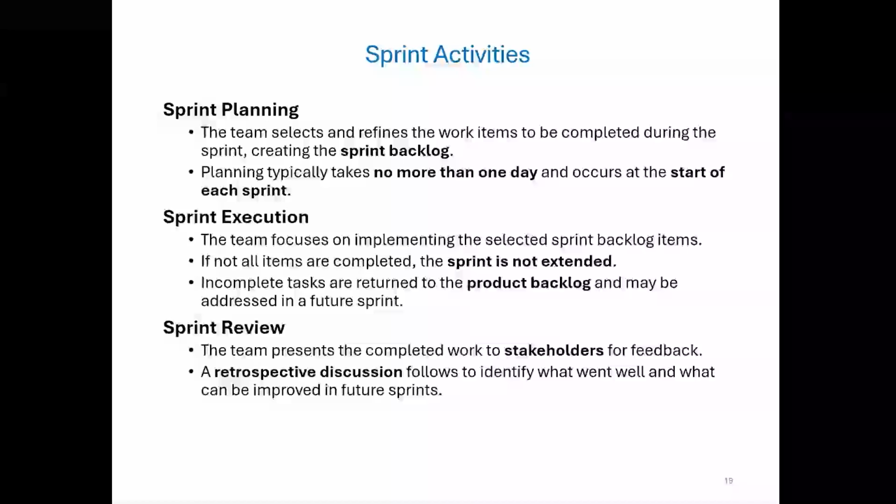At the end of the sprint, we have the sprint review. This is like a show and tell with the stakeholders. So the team demonstrates what they have built, ideally something that's functional and potentially shippable. Feedback is encouraged because it helps guide the direction of future development.